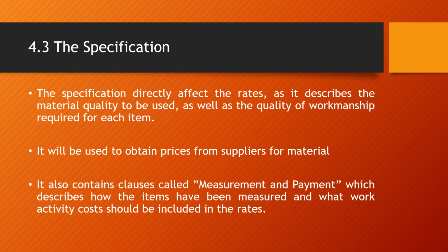The specification also contains the clauses called measurement and payment that describe how the items have been measured and what work activity costs should be included in the rates. So basically, it tells you, okay, in this particular rate, this is what is included, and this is how you should do the work.